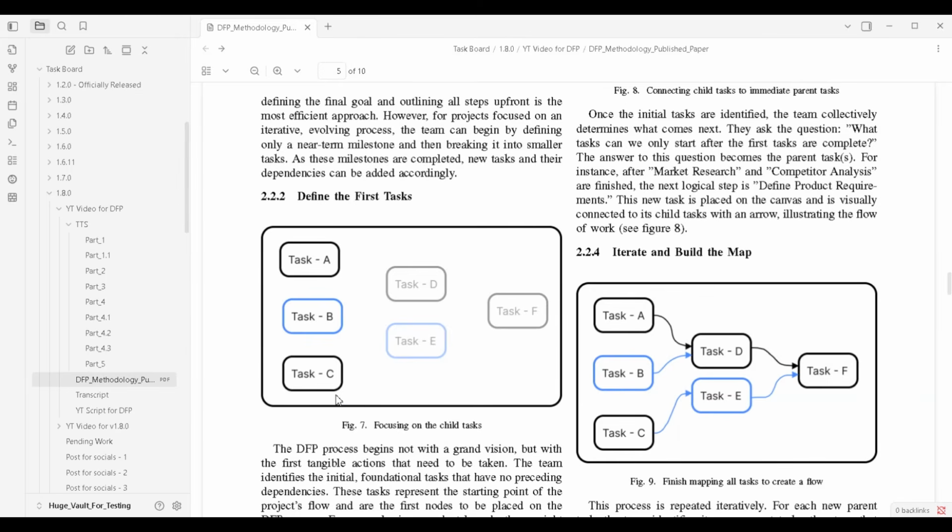Again, using the WBS methodology, you can break down this task further to find what are the smaller tasks which you need to complete to start with the task A, etc. But for now, we take an example that task A is an independent and granular task which we can start now directly to proceed with our project flow. You can divide your team into 3 parts and then all these subteams are going to start these tasks parallelly. So these are independent tasks which you collect in your second step of implementation of this methodology.